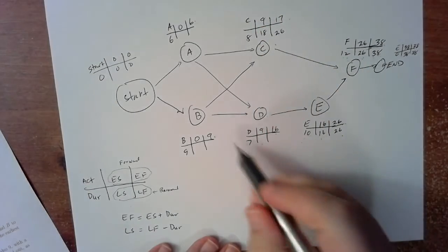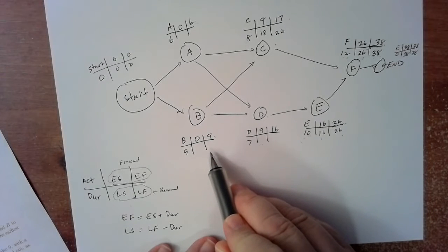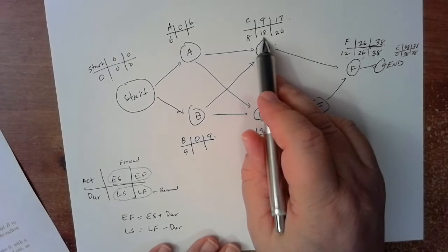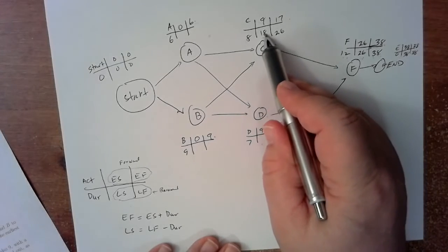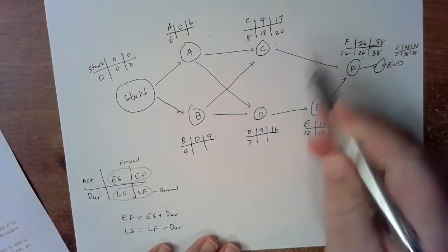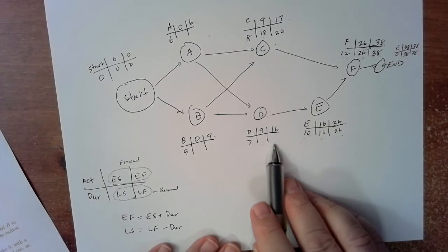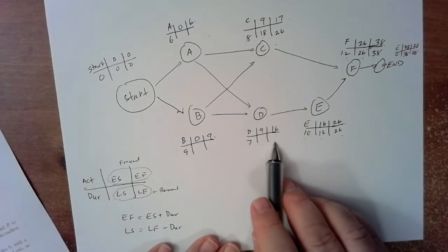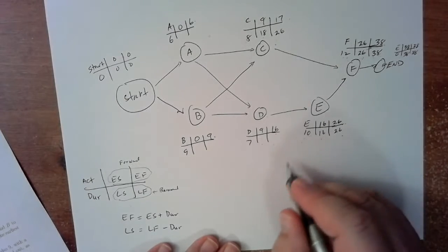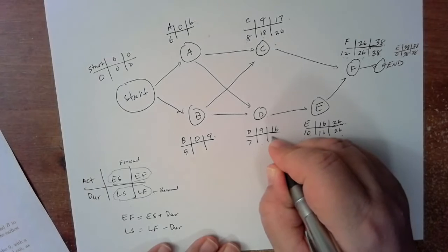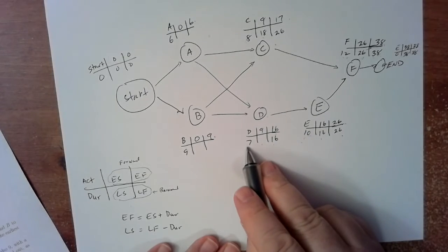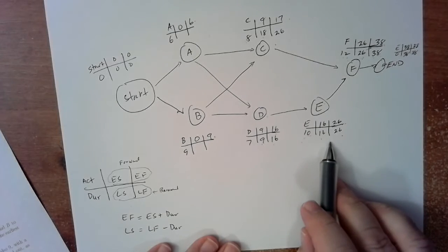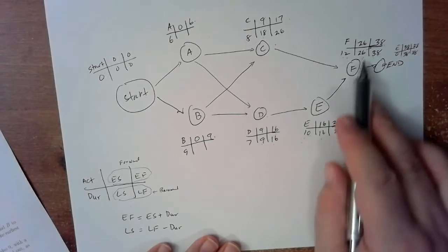Good. And now how about activity D? Node D has to wait until time 16 to start. And there is no other node to take into account, so I'll just put the 16. 16 minus 7 is 9. So you're probably noticing something, right? Something interesting is happening here.